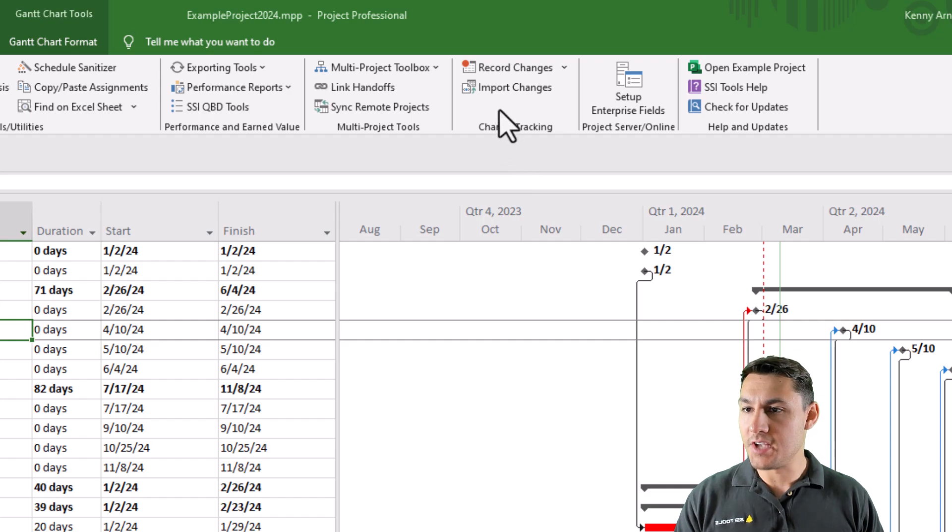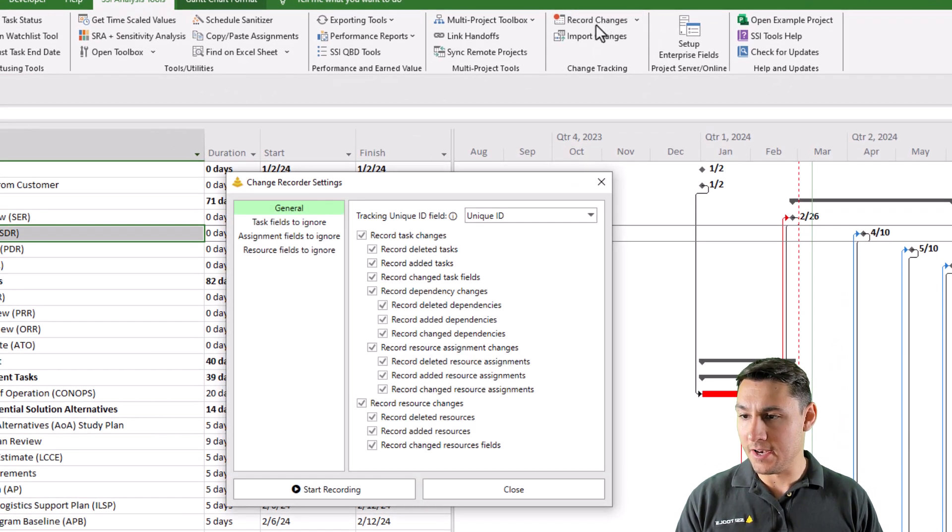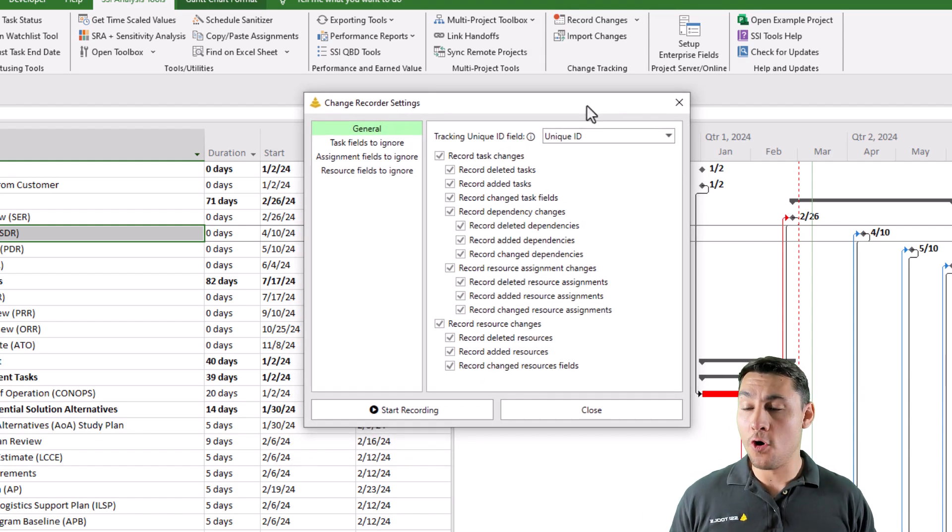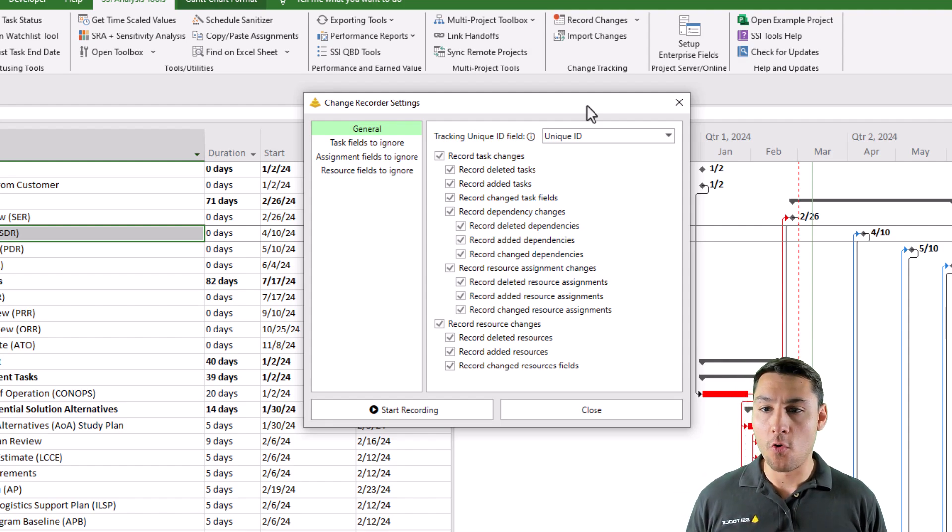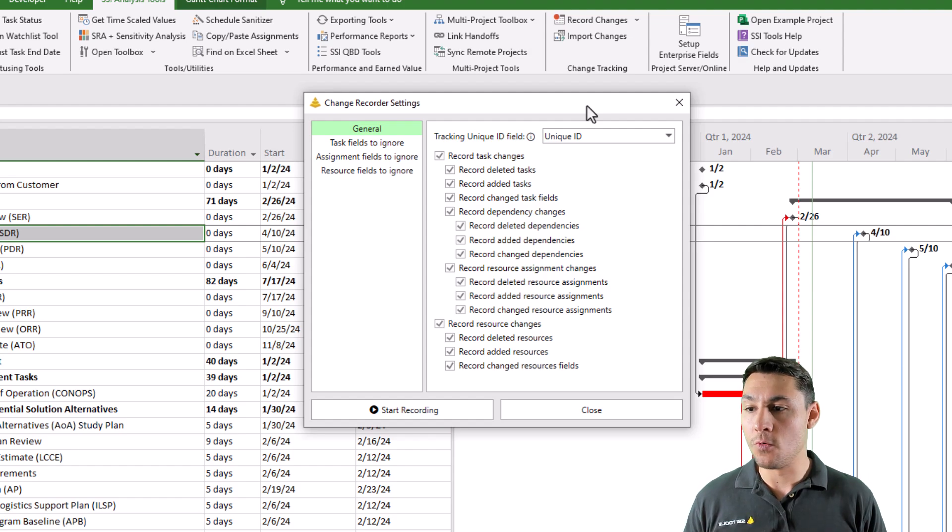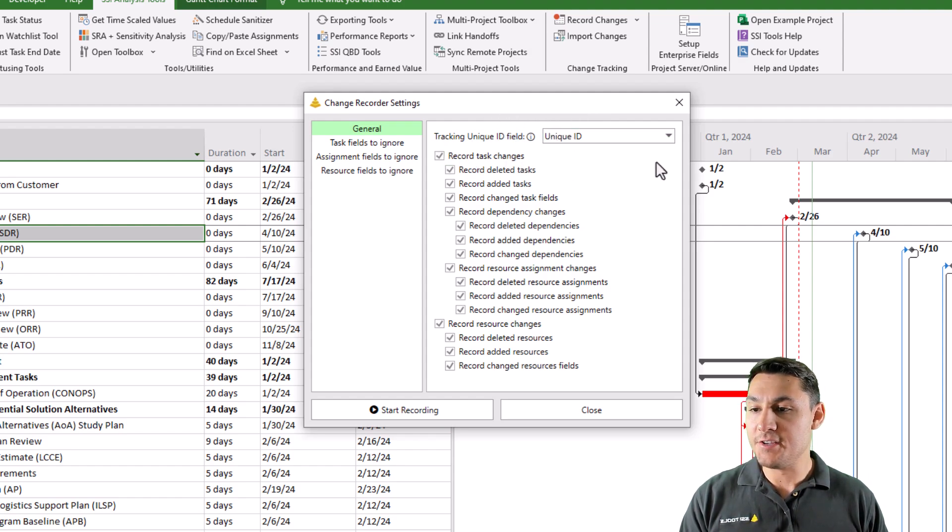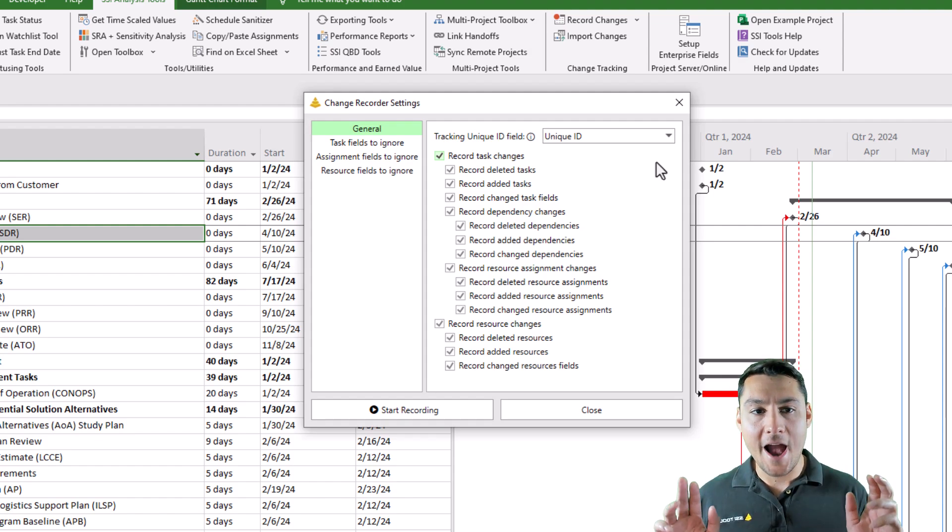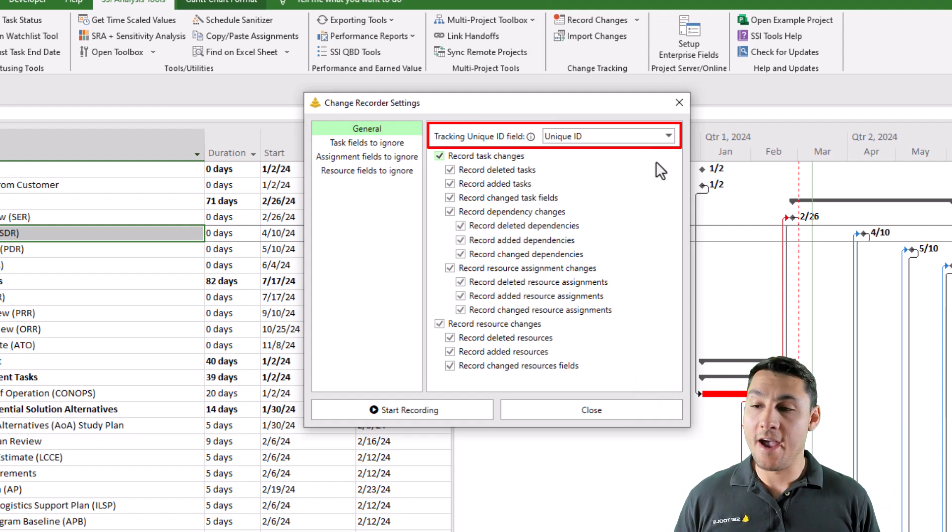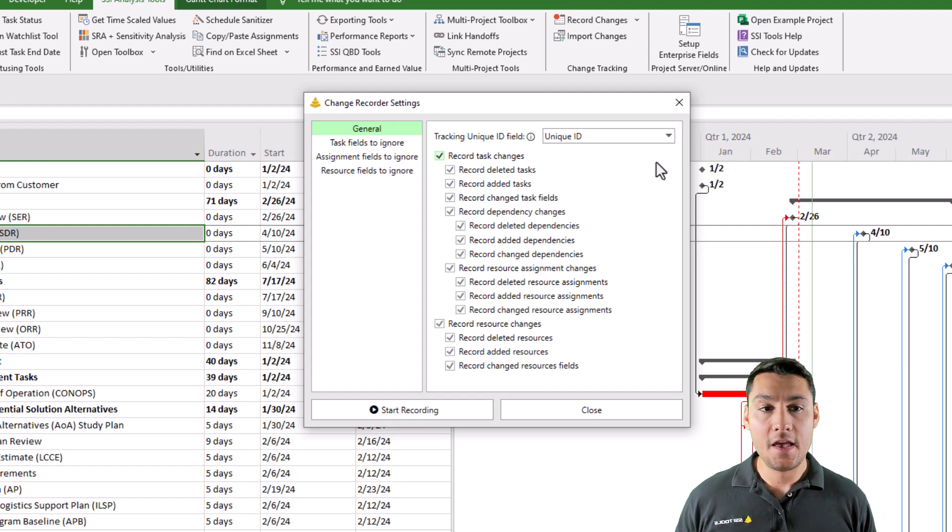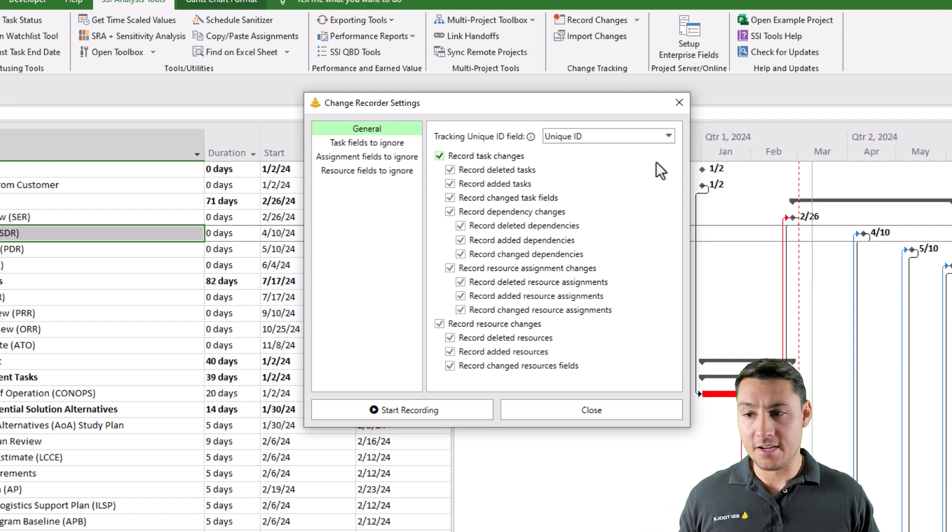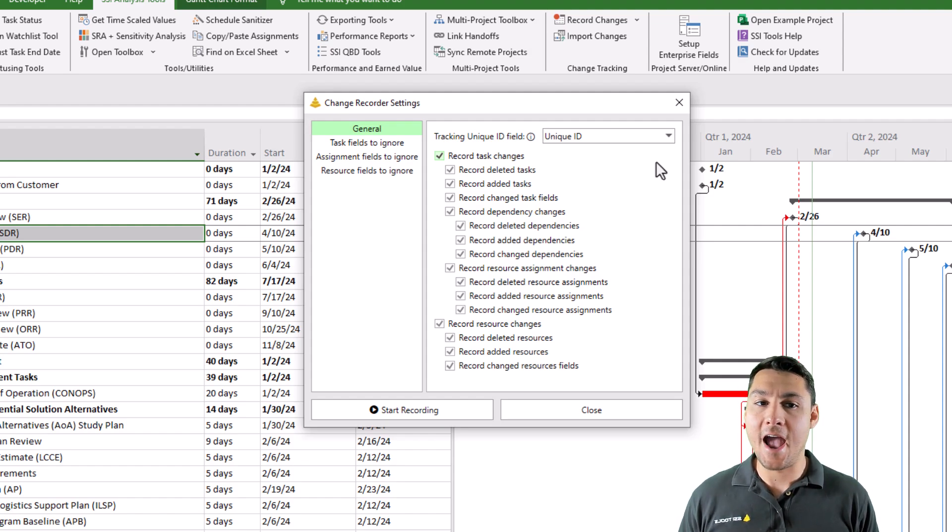To do this, I'm going to click the record changes button. As soon as I click on that, a form is going to open up asking me to confirm my options before recording begins. There's a couple really important options that you'll want to know in here. Most important is which field is being used as what we call the tracking unique ID field. This is just whatever field in the project that is going to be unique for every single task. If you're working in a multi-project environment and stitching all those multi-projects together into a master project file, this may not actually be the unique ID field.